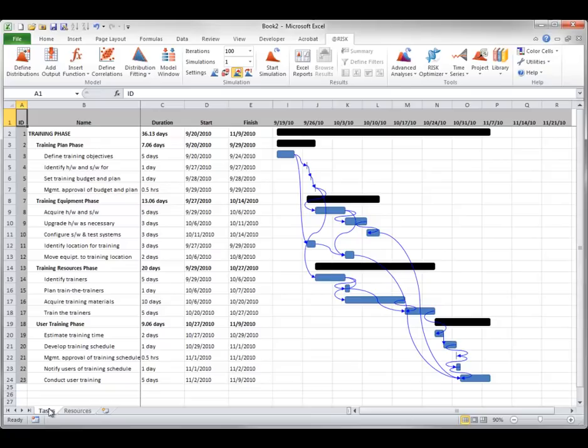As mentioned earlier, the imported project is also open in Microsoft Project. This is because At-Risk uses Microsoft Project to perform scheduling calculations when it runs its simulations. When using At-Risk, your original schedule stays in Microsoft Project, and the model for the risk analysis is built in Excel. Formulas and functions can be added to cells in Excel where the task and resource dates and values are shown.